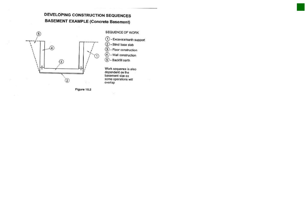We've got a very simple example of a basement that needs to be constructed. You've got your excavating and support, your blinding slab, your floor construction, wall construction, and your backfill. You can see it's been drawn out — this is the diagram that the previous figure spoke about. Having a diagram just makes it much easier, and this can also be utilized whenever you do a method statement.